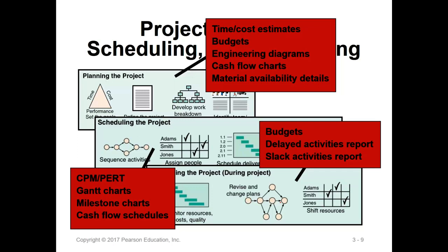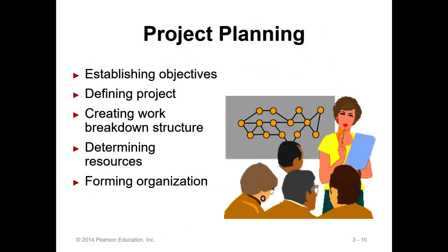In this class, we are going to give you the seed or the concept in the beginning. We have to keep this in mind. Later on in other classes, maybe you can learn more. And in project management, we want to define the objective, define the problem, the project statement. And one important thing is to create the work breakdown structure. There is a big project goal. Underneath, you can break the big activity into small activities. Otherwise, you cannot assign the big activities to specific people.